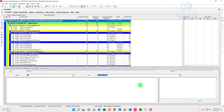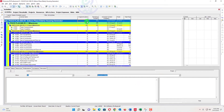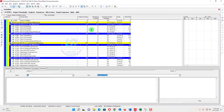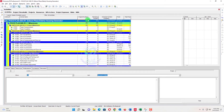It's the standard to use working days in Primavera P6, but the client wants to know where you show your contract duration. These 261 days are not the contract duration — these are working days duration. So without changing my dates below, how can I display the contract duration? There is a small trick I have explored.